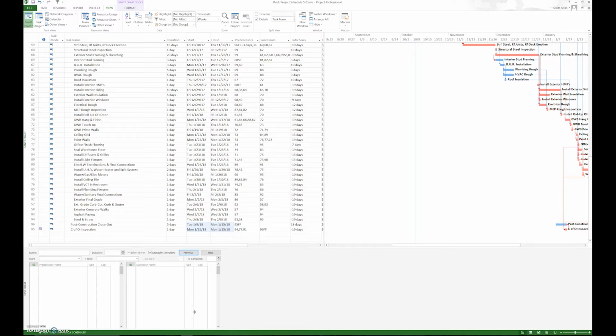Step number 14 is compression. Once again, why do we go back to step number 10 and do compression again? Because as you add in cost resources, move activities around, reduce excess float, remove redundancies, what's going to happen is the schedule is going to become longer, meaning you cannot fit it within the time frame allotted.